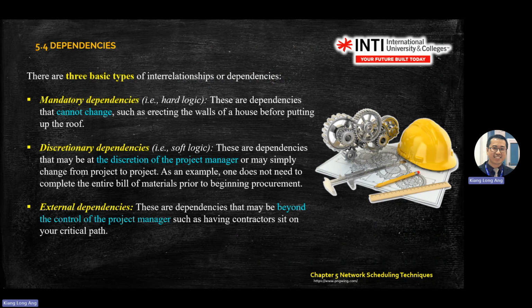Okay, there are three types of dependency, meaning the parameters you use to do analysis. Mandatory dependency means hard logic, a parameter that you cannot change.